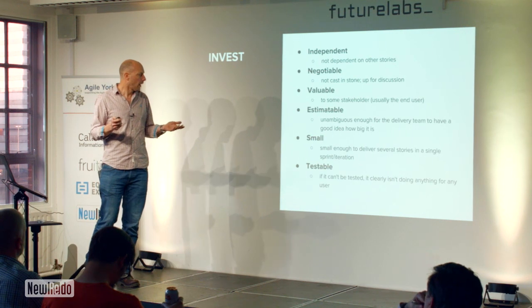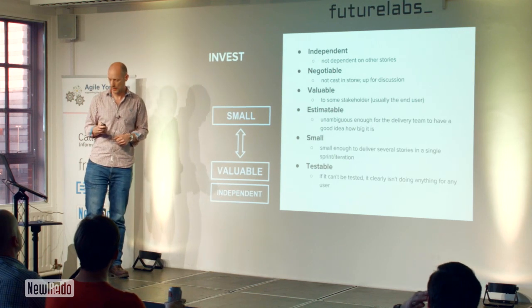So these are often trotted out as if they are the holy grail of stories. But my experience is that it's very difficult to get all of these at the same time. And in particular, there's definitely a trade-off between small and valuable. So the smaller you carve up stories, the less valuable they get. And also, the smaller you carve them up, the harder it is to keep them independent as well. Okay? So I tend to see INVEST as being a set of guidelines rather than a set of commandments, as it were. But good guidelines, useful guidelines, nevertheless.